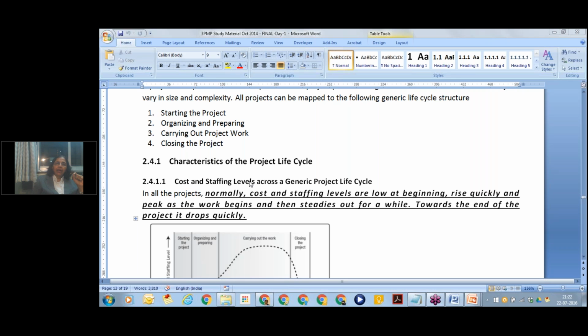Initially, do you have all the team on board? Do you start working with all the team? No, you won't. See, if I need 10 people together, 4 of them are for planning and 6 of them are for actually working. Those 4 people will work for about 1 week, then those 6 people can actually start creating the deliverables. That's my case.